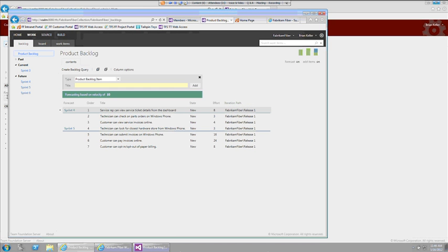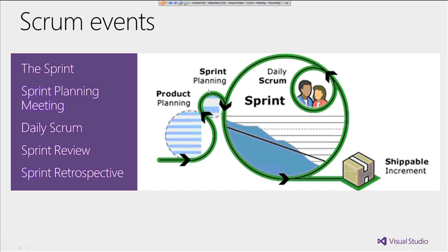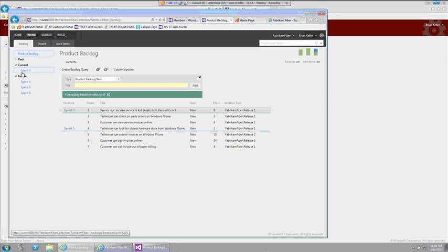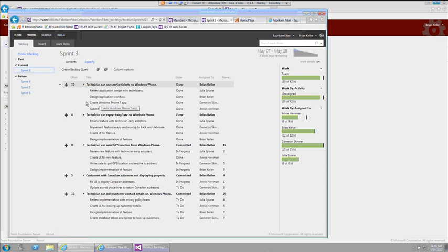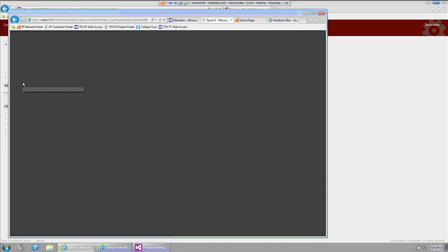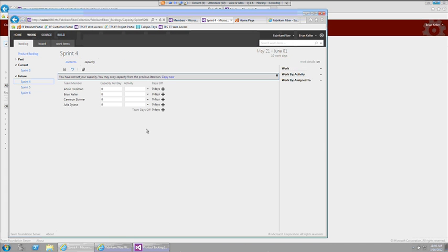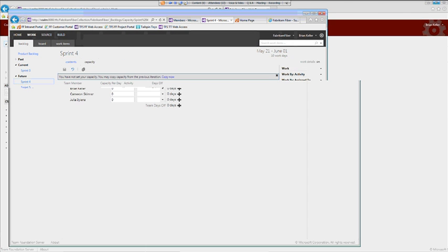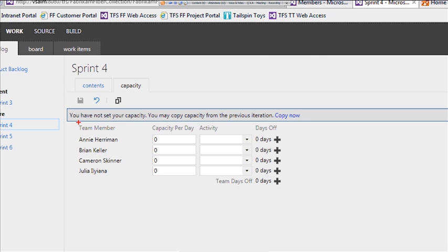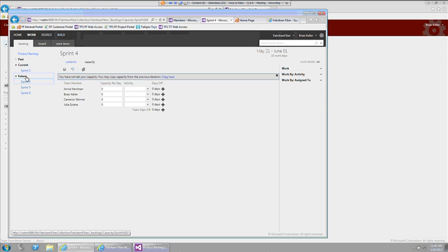Now, as we proceed into the sprint, as you guys remember, I will be looking into sprint planning itself. As I do the sprint planning, the next thing that I will probably use is the following view, a view such as this, right? This is actually an example of an ongoing sprint. If I'm planning the sprint like sprint 4, I would be adding items in here based on my capacity, right? Now, notice that capacity is what the team will have on that particular sprint.